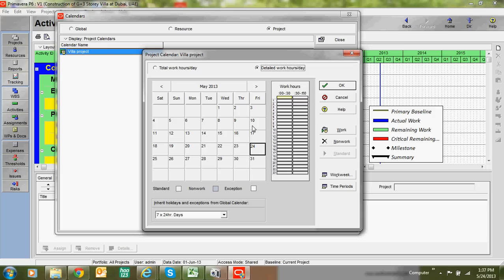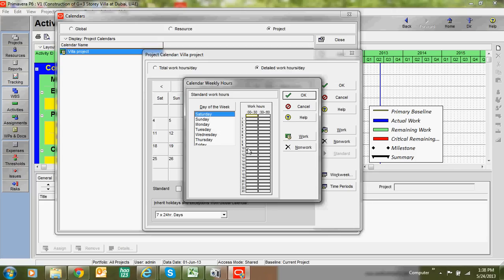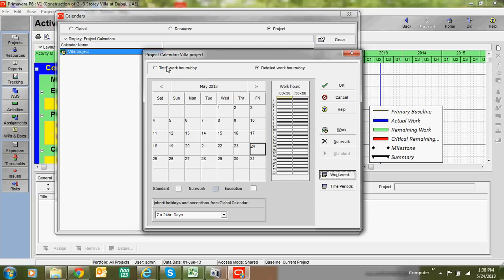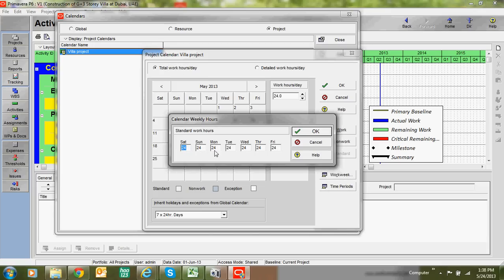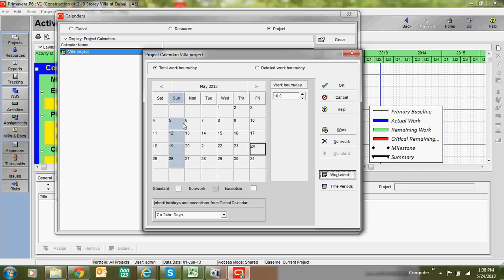To modify the calendar according to our requirement, go to Work Week. You will see Saturday, Sunday, and Monday listed. Change the default 24 hours to 10 hours for each working day. Set Sunday to zero hours to mark it as a holiday. Click OK — you can now see that Sunday is marked as a holiday.